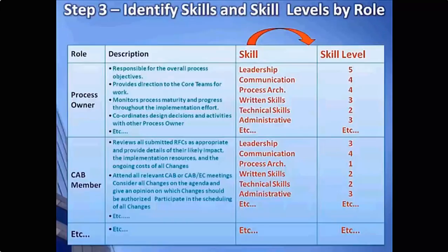So in the example above, you can see that we've rated skills 1 through 5. A 1 means just basic awareness is needed, not much of the skill other than just knowing that it's somewhat out there. A 5 means that an expert level is needed. Other ratings, such as a 3, might indicate a moderate level but be able to work independently. A 2 might be moderate level but still needs supervision when working. A 4 might mean they can lead and teach others in the skill.